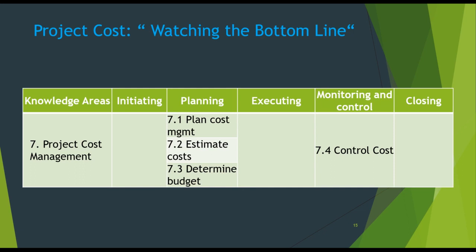Project cost management is a process concerned with planning and controlling the budget of the project. This process includes activities such as planning, budgeting, estimating, financing, funding, managing and monitoring costs to ensure the project is finished within the scheduled budget. It covers and tracks the project's total expenditure against the actual budget. The processes are: plan cost management, estimate cost, determine budget, and control cost.